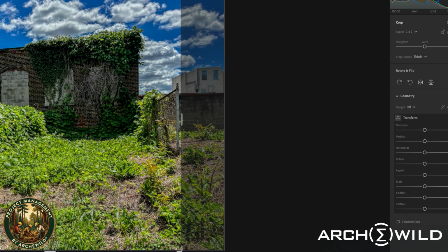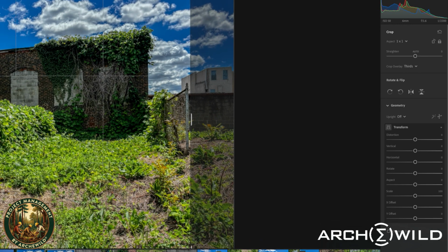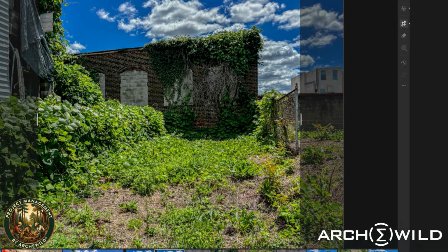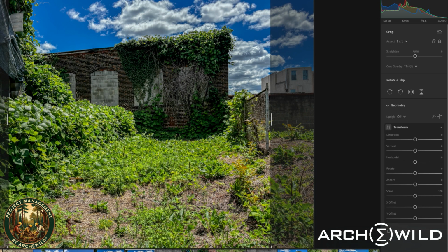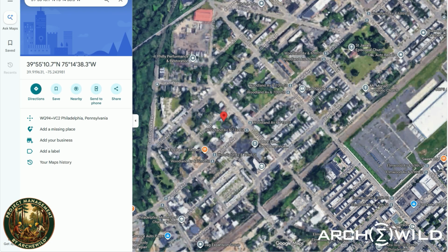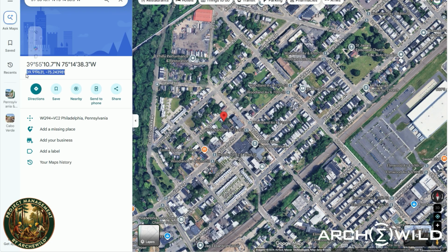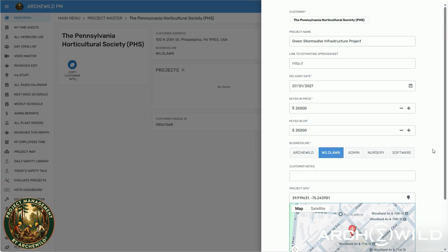Here, there are multiple projects, but just for compliance, I will grab the GPS coordinate from a random site there. That's just to drive project maps. All right, so that's all we need to do really to set up a brand new project: the value, the contribution margin, the business line, a GPS coordinate, and a good name. Good? All right, save.